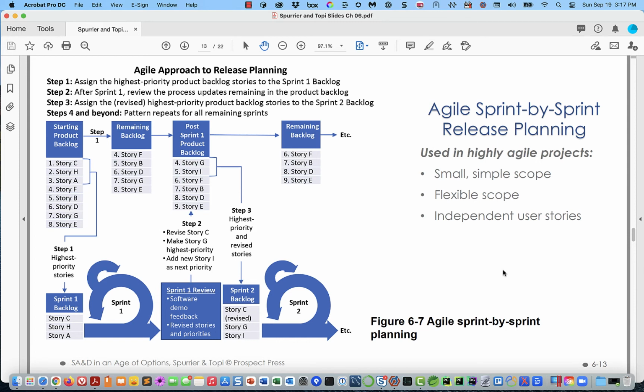Now, again, in the true Agile approach, are we promising that we're going to do these things in exactly the sprint in which they showed up when we were doing a product roadmap or release planning? The answer is no. We're just using our best guess to settle people down so that they have some idea about how we think it's going to go.